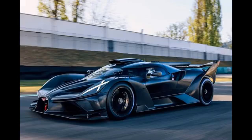6. Testing tuning. Conduct initial shakedown runs at a secluded drag strip with extensive safety measures to evaluate the car's performance and identify any areas for improvement under Wayne's supervision. $8,000. Fine-tune the engine, suspension, and drivetrain for unparalleled performance, aiming to achieve a sub-3.3-second ET during testing. $5,000. Total testing tuning costs, $13,000.